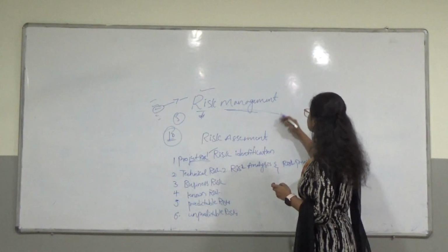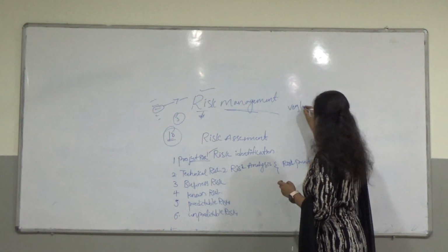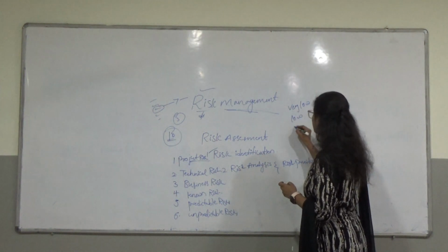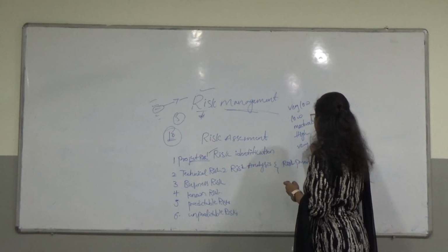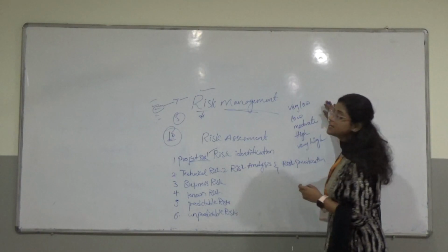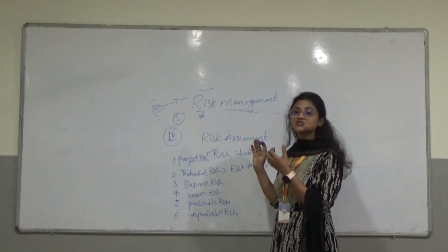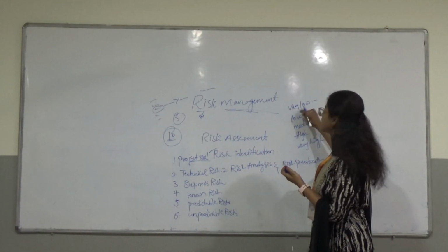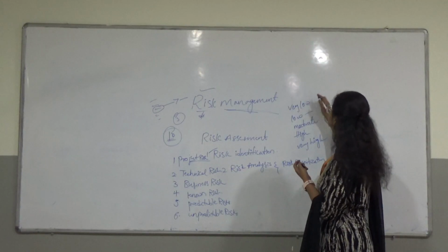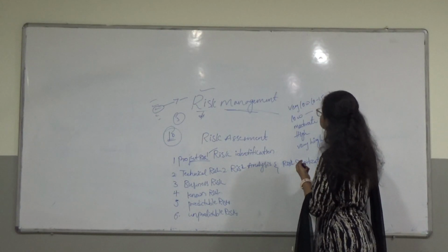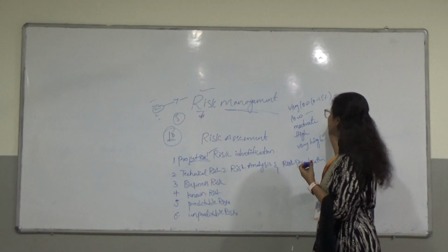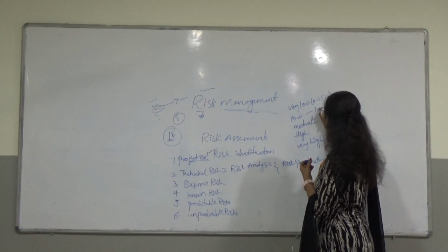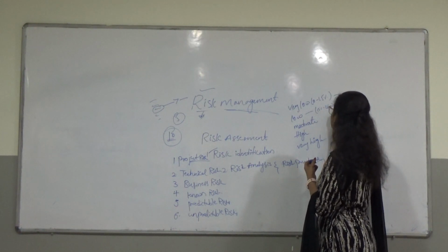Here the probability of the risk will be very low, low, moderate, high and very high. So you need to identify how much percentage the risk is impacting your product. If the risk is very low, that means it is 0 to 15%. That type of risk can be easily manageable, right? And the next one is low, which is from 15% to 25% of the risk.